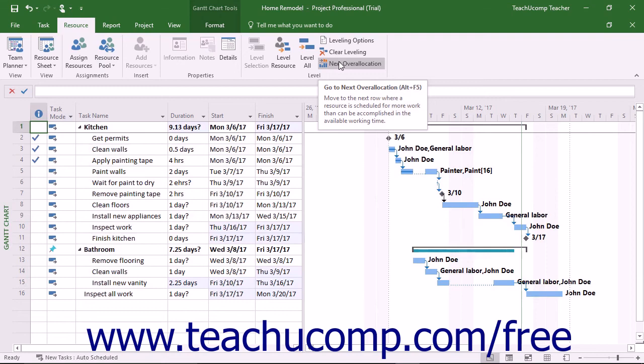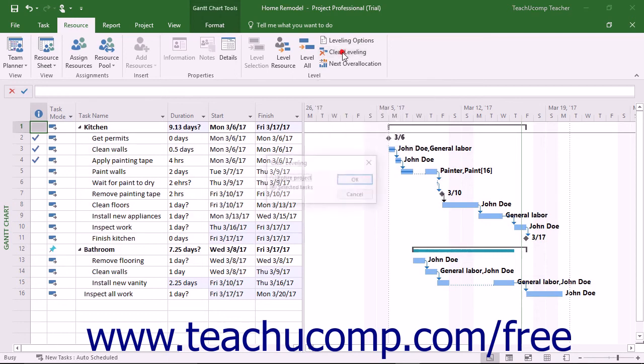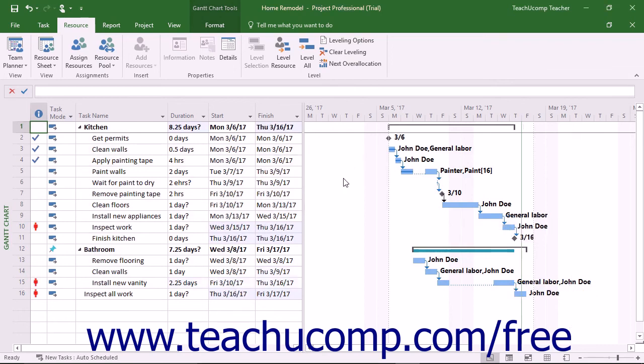To clear a resource leveling you have applied, click the Clear Leveling button in the Level button group on the Resource tab in the ribbon. When you do this, a Clear Leveling dialog box appears where you can choose either the entire project or Selected Tasks option button. Then click the OK button to remove the resource leveling you have applied.